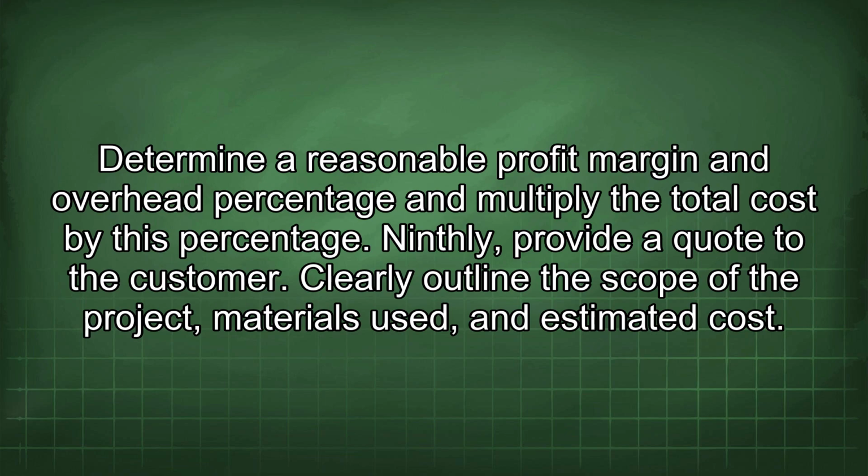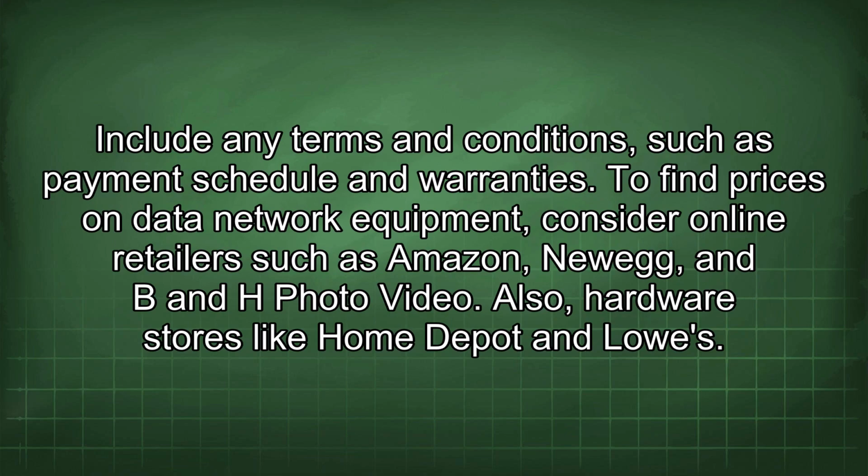Ninthly, provide a quote to the customer. Clearly outline the scope of the project, materials used, and estimated cost. Include any terms and conditions, such as payment schedule and warranties.